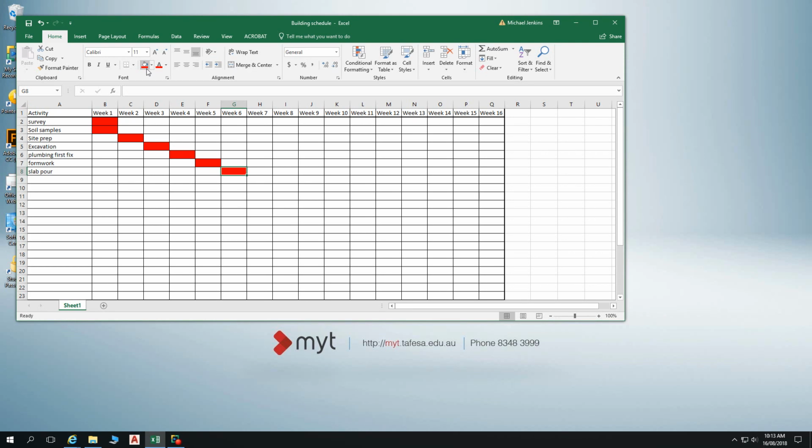So once we've got our slab poured, what are we going to do after that? Wait for it to cure. Yeah, that is a really important thing that often doesn't get missed by builders, but gets missed by students. So how long are we going to give it to cure? Looks like 2 weeks in most cases. How much do they give it on site before the chippies arrive, or I guess you're well away by that time, aren't you?